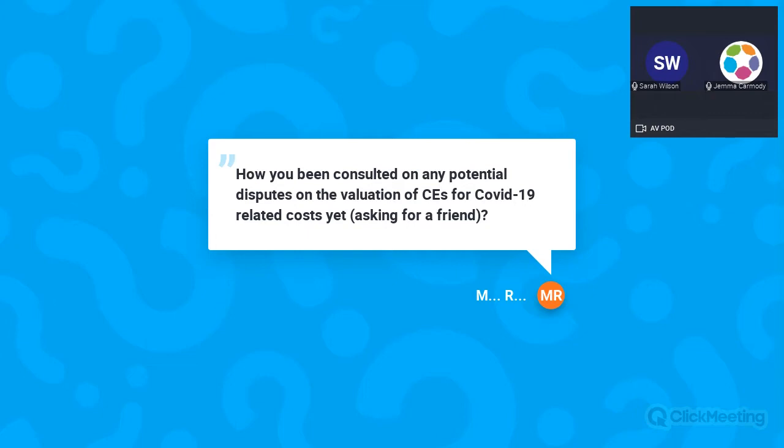So be a little bit skeptical if you're on a JCT and you're awarded an extension of time for COVID. Make sure it is genuinely COVID and that you're not entitled to your costs as well. But yes, COVID related costs would be calculated on the basis of whichever, a shorter schedule if you're on options